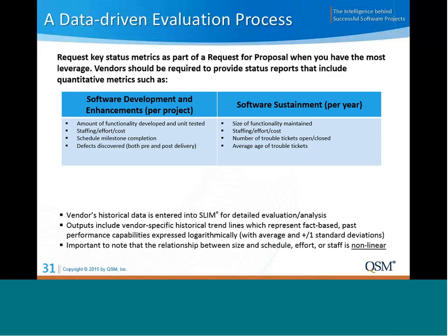So in order to get this data, it's important to write it into the RFP, the request for proposal, and make it part of the contract. That way they can easily be collected on a routine basis as part of a normal vendor status report. So there's no pain involved or very little because, again, this is a byproduct of normal software development.